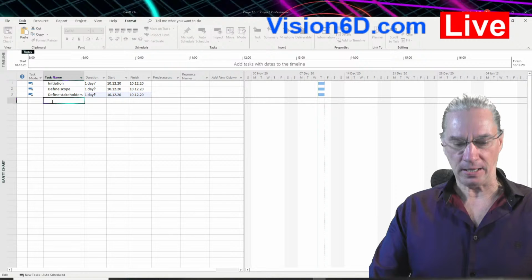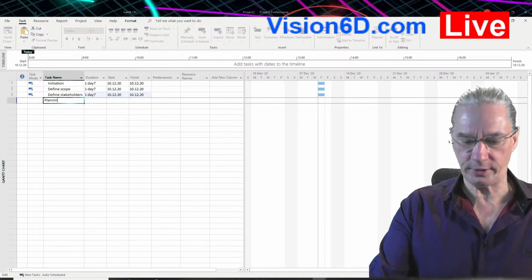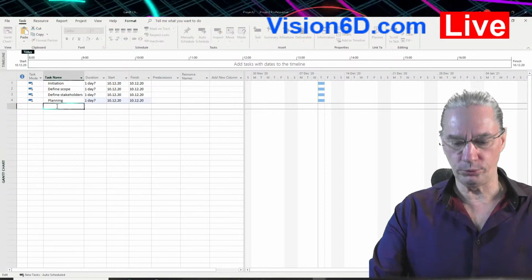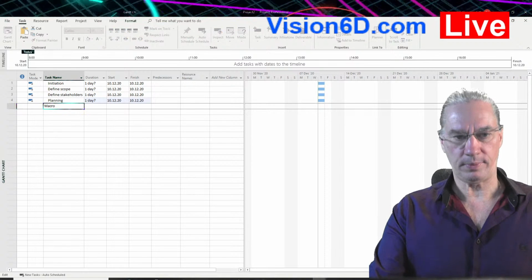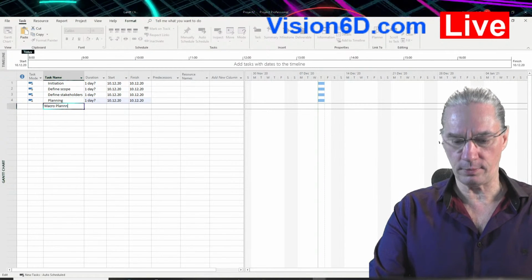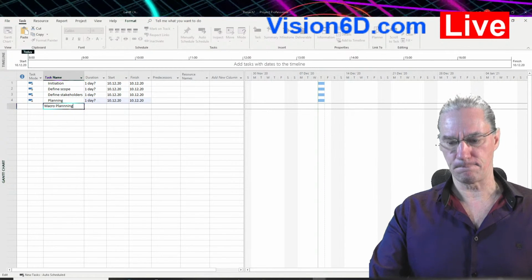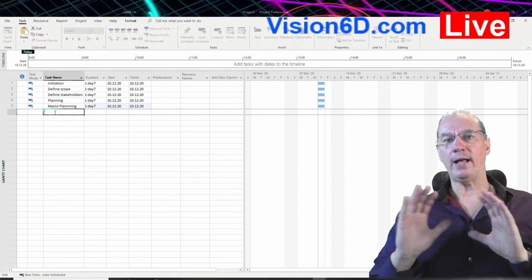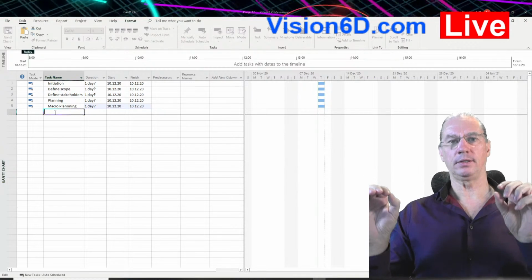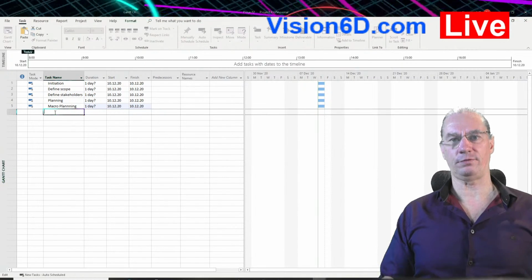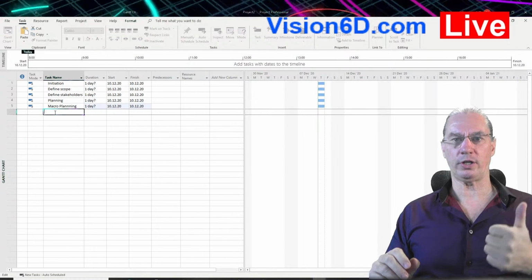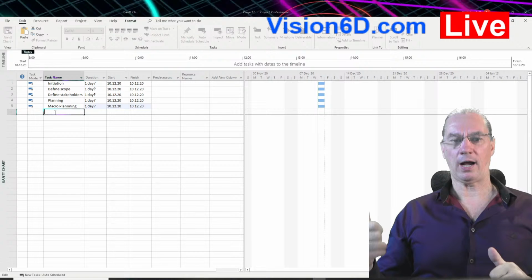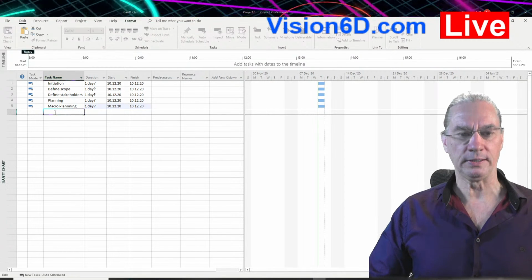I will enter in what I call planning. And in the planning, of course, I will do a general level planning, which I called a macro planning. The macro planning itself should help me to set the major milestones of my project, like when shall it start, when shall it finish, are there decisions to be taken into this project.